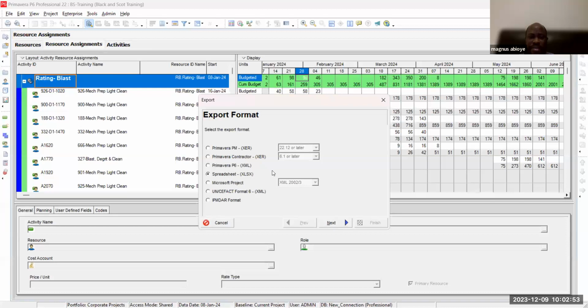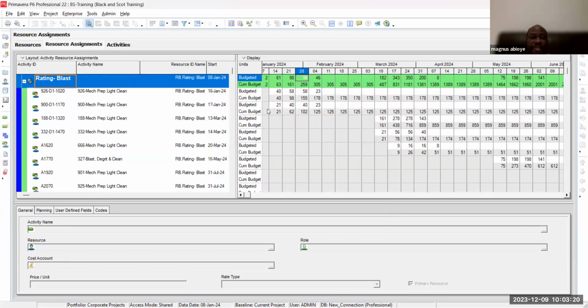I think it's telling me no, I cannot. It says you cannot export to Excel while subunit or sub for duration time are enabled. Please disable the subunit users preference. So there is a setting that needs to be complied with in the Excel sheet before you can then use that Excel sheet and import it back. So the setting has to be there. So this is it about the resource.